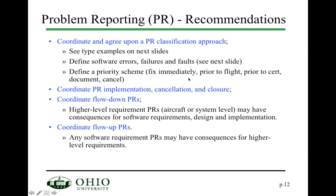You need to coordinate problem reports. You're going to implement the resolutions described in the problem report, or you're going to cancel them if they're no longer necessary or no longer a problem. Then you can close out the problem reports.